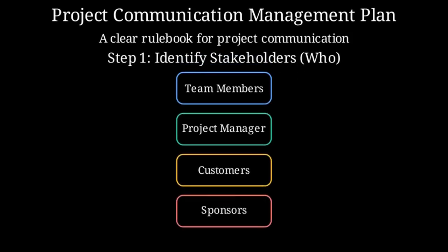In this video, we will build a project communication management plan step by step. Step 1 is identify the stakeholders, the who. These are the people involved in the project. We have team members, the project manager, customers, and sponsors.